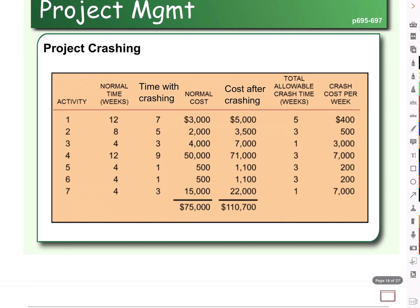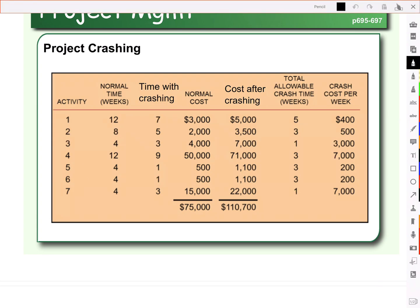So how do we do that? We need to know our crash cost per week, and we need to know the total allowable crash time. That is, each activity you can shave off a bit of time, but you can't get rid of the whole activity in its entirety. So if activity one normally takes 12 weeks and we think we can get it down to seven, that means that we have up to five weeks we can shave off.